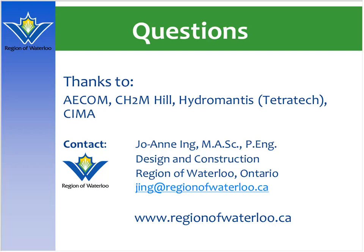We are actually using value engineering on one of our smaller wastewater facility upgrades, because we thought that there could be some potential savings. We had some upgrades that we were planning over the next 5 years, but we didn't necessarily want to spend all of the monies up front, and we were able to look at it from a different perspective, looking at Kitchener as sort of a model, but splitting the contracts into separate stages. So the value engineering was very helpful there.